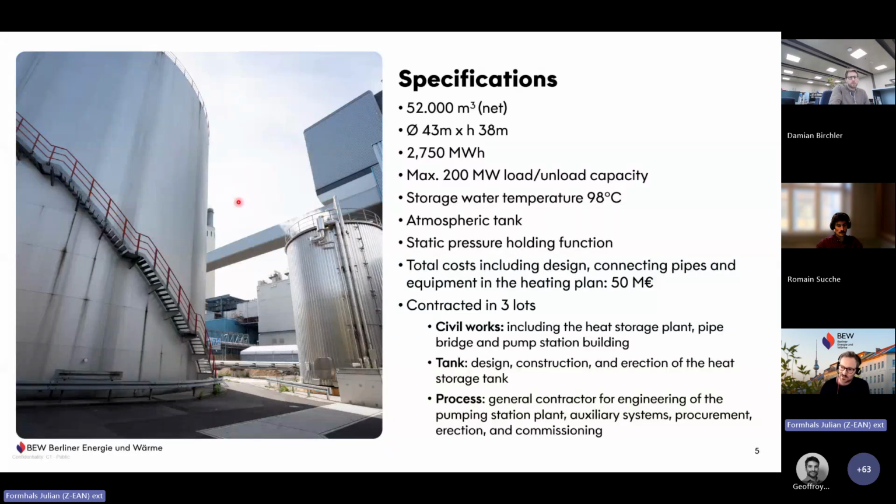But this is the total project cost, which is always quite a bit higher than the specific costs of the tank only, because in this case more than half of the cost was for the pumping plant, the connection, and the overall surrounding system.